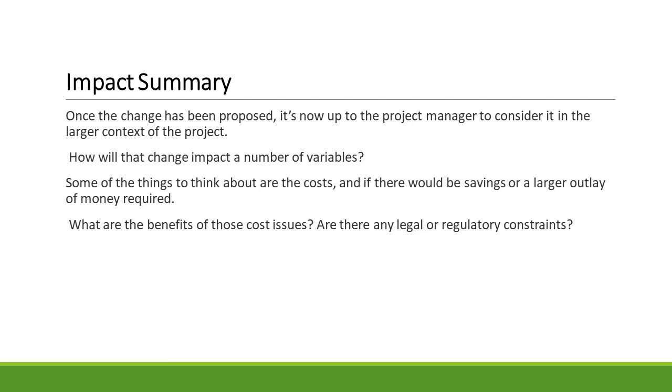This evaluation prevents conflicts or disruptions across multiple projects. 5. Stakeholder implications. The impact on different stakeholders, including clients, team members, and end users, is explored to understand potential concerns. 6. Risk identification. The evaluation identifies any new risks or challenges that could emerge due to the proposed change.